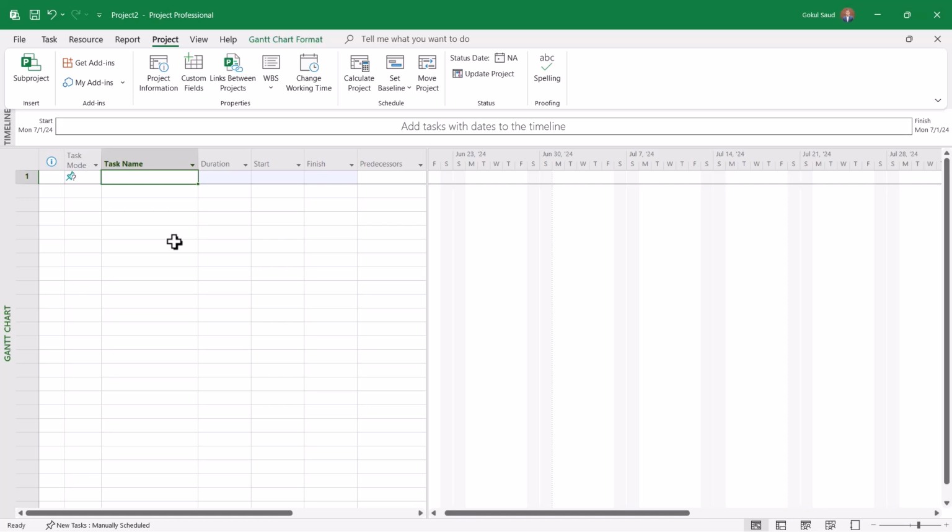Once you have all the drawings and things, you study the drawings. After that, you create a whole movie in your mind of how you're going to start the task, how you're going to start the project. So you have to imagine that first thing you'll set up the camps, that is the mobilization part, right? Then you will do the surveying and layout things. Then you will do the excavation. Then you will finish the foundation. Then you will do the tie beam. Then the ground floor columns. Then the beam and the slab. Then the first floor columns, beam and the slab. And for all these tasks, you have to know every detail.